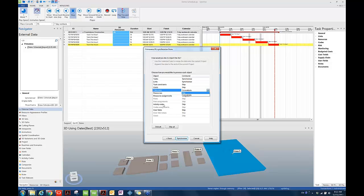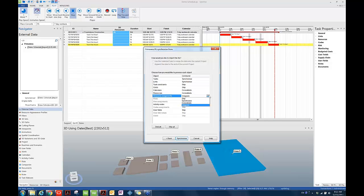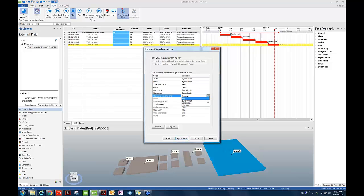By using consolidate, which is similar to synchronization, it's going to bring in all the changes except that attributes in the Synchro would not be deleted. For resource assignments attribute here, we can keep the default option integrated, but there will be no difference if we choose consolidate. That is because first, we have only one source project. Two, no changes have been made to resource assignments in the source project in P6. And only material resources have been created and assigned to tasks in Synchro.